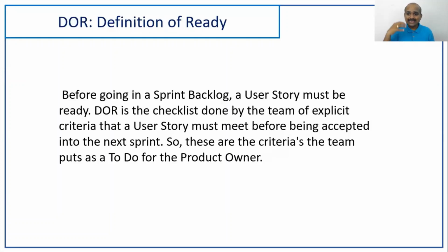So looking at the INVEST principle, people can come back and say user stories should be defined at the smallest possible level. Number two, user stories should be defined in a template: as a user, I want this functionality so that I can achieve so-and-so benefit. Acceptance criteria should be defined in a specified format.